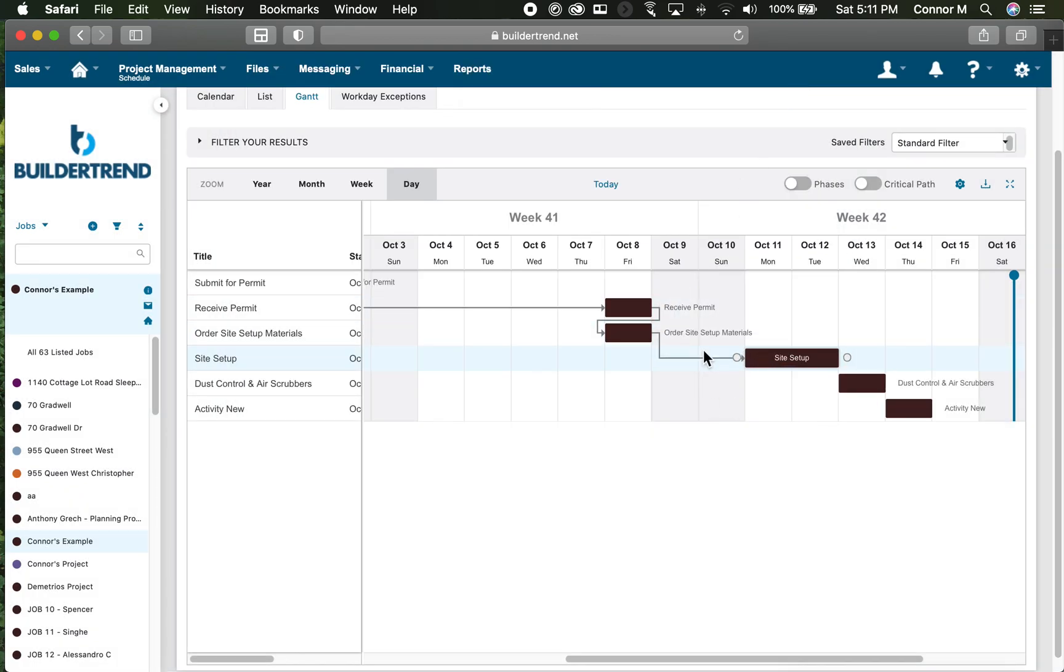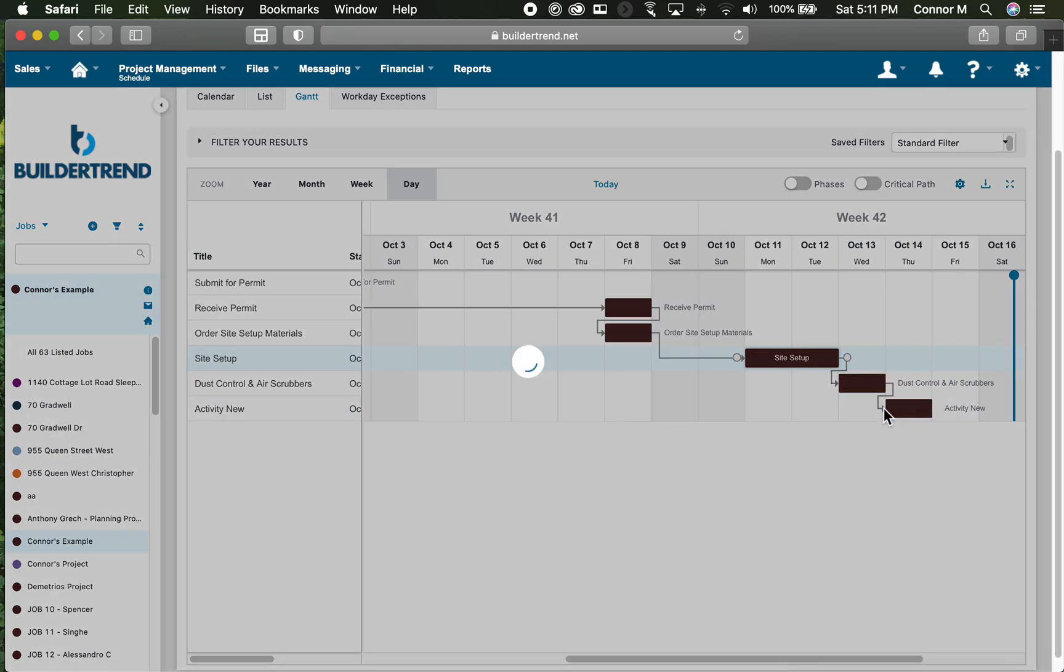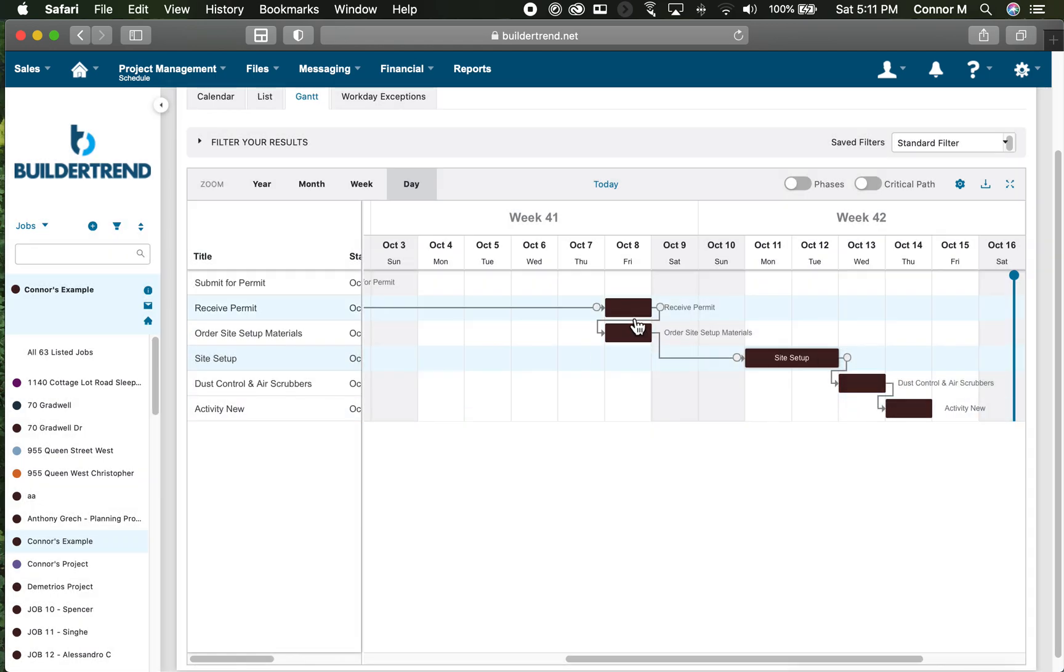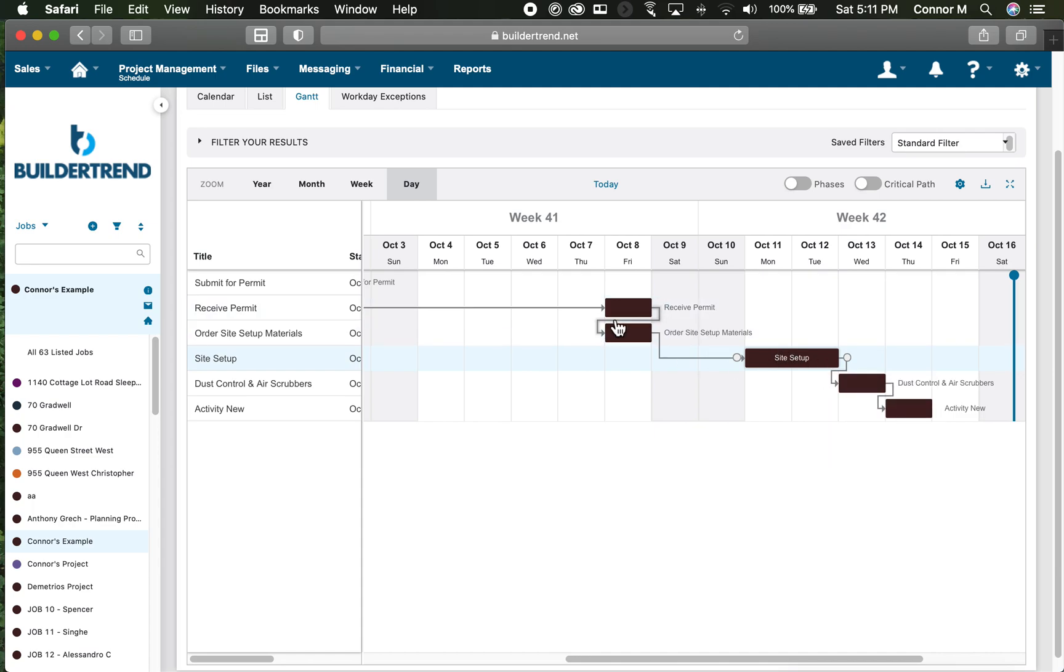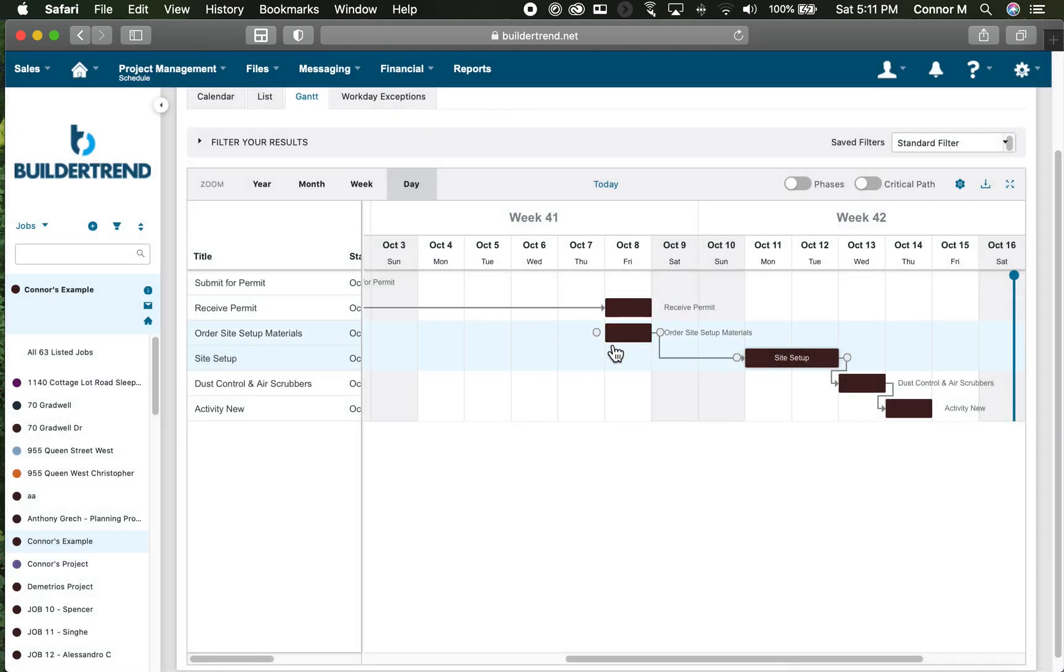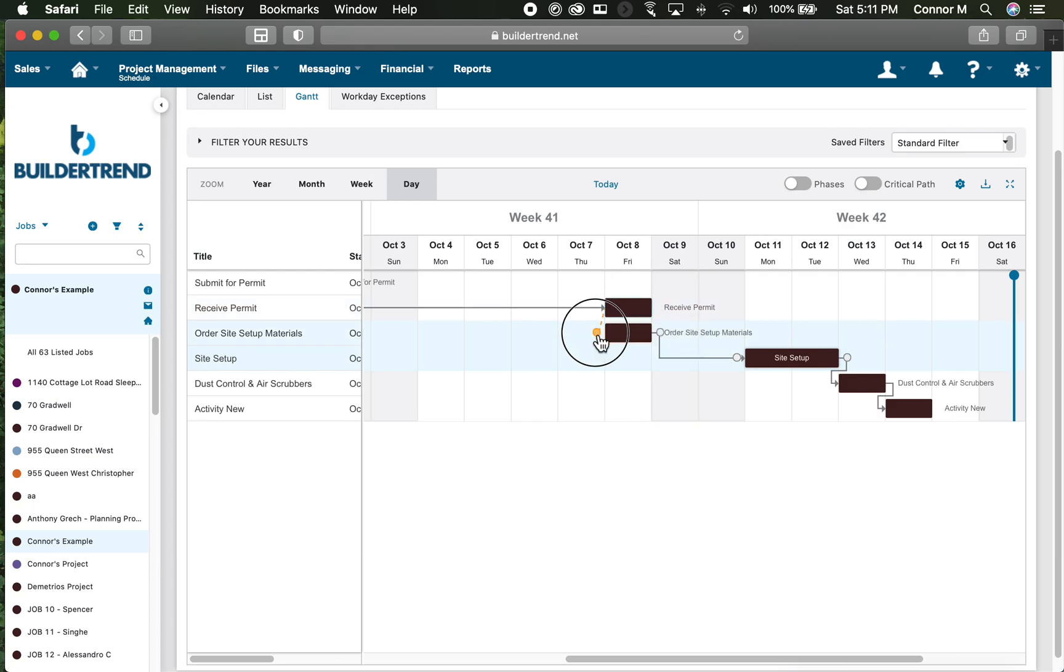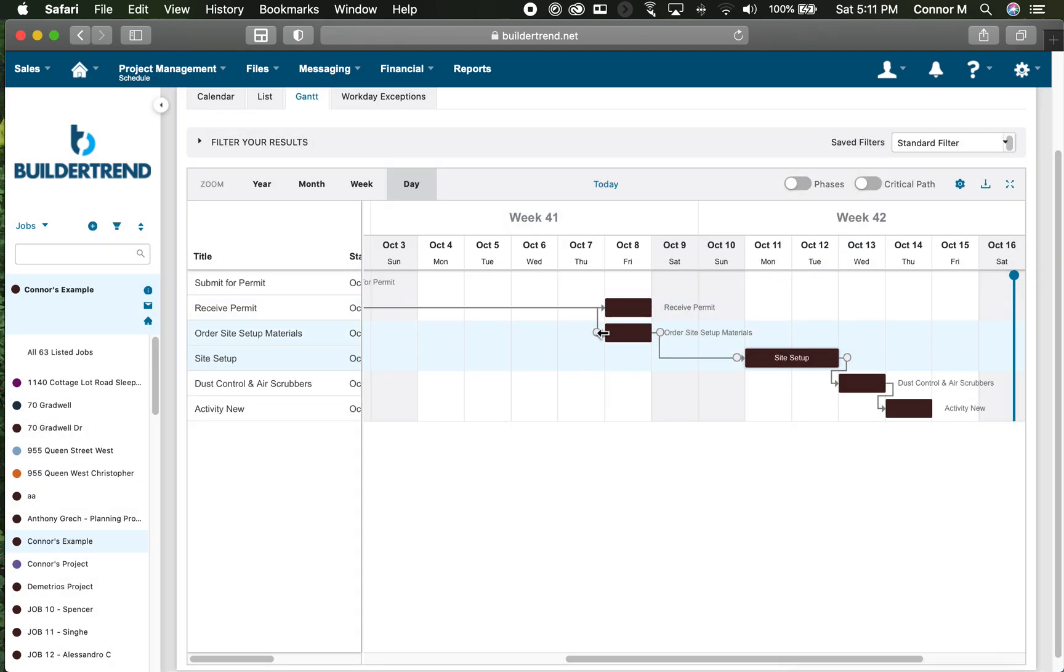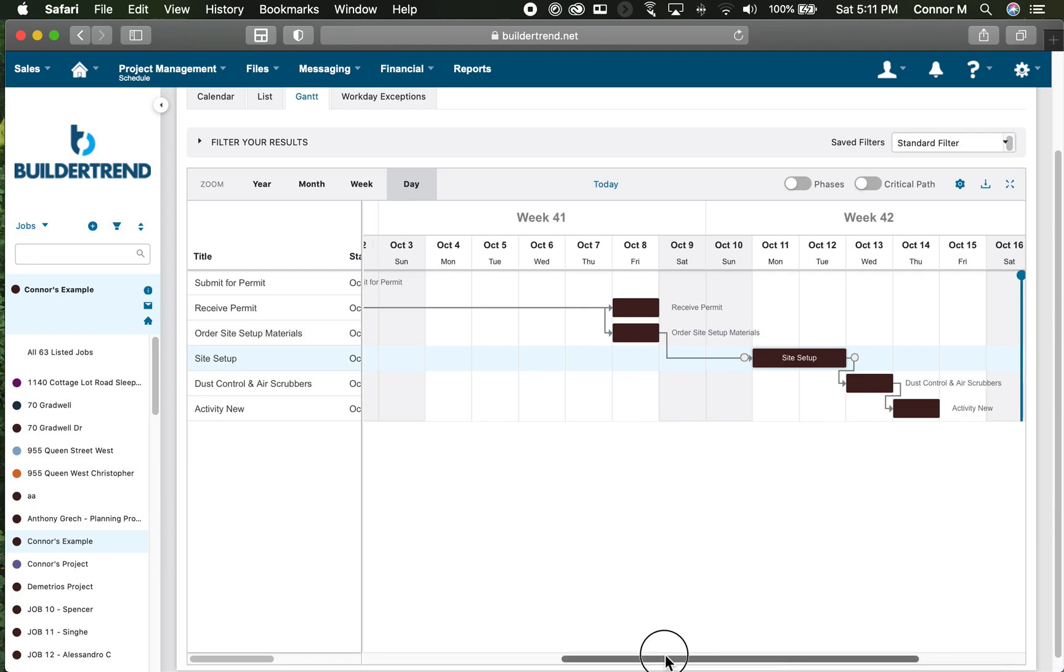I find in Gantt view it is much faster to just drag the dots and show these connections. For finish-to-start they all work like that. If on the same day that I receive my permit I can start those two activities at the same time, I can grab the ball before receive permit and drag that down to order materials. It displays a start-to-start relationship.